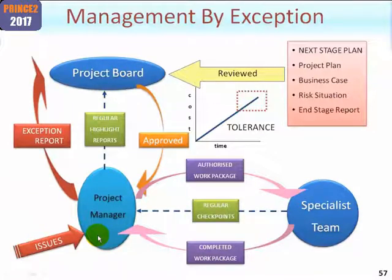The project manager must bring it to the attention of the next level of management — in this case the project board — via what's called an exception report, laying out the reasons for it, the impact, options for recovery, and a recommendation by the project manager.